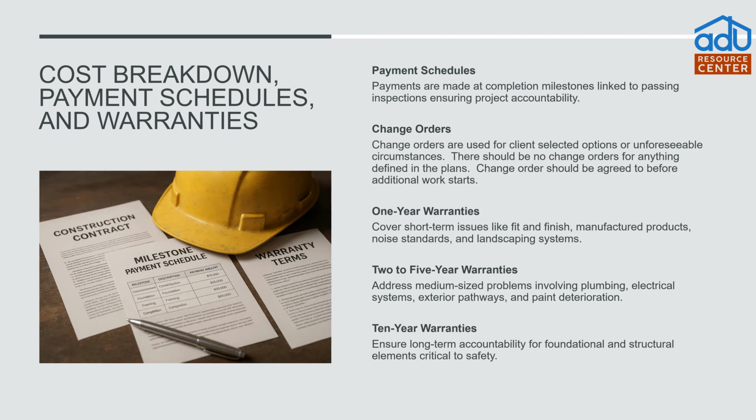Warranties. Now, there's a couple things when it comes to warranties that some folks don't quite catch, and sometimes the contract doesn't show it clearly. You'll pretty much always see in a contract a 1 year warranty that'll cover fit and finish. Everything that goes in, everything that you can touch is going to be covered under the manufacturer's or the contractor's 1 year fit and finish warranty.